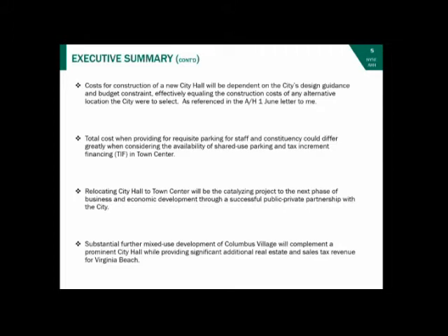And in doing so, their letter also stated that upon having an opportunity to look at the Mosley presentation that was delivered last time we met 2 Tuesdays ago, they are in agreement with the Class A office space cost estimates that Mosley put together, and have agreed that they can deliver a not to exceed commitment to the average cost of those 4 options, which is about $56 million.